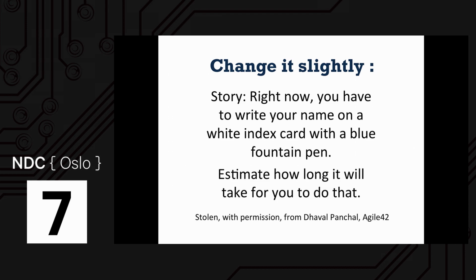that could be optimistic. Because first of all, you don't know what size of an index card we need to write it on. And you don't know if we allow it to have lines on it or not. So that's a beginning. What about another requirement? When I say a blue fountain pen, do I mean a fountain pen with blue ink or a fountain pen that is blue in color? If you brought it to me and it's blue ink and I go, that's not what I meant, use a black fountain pen, then you wouldn't have met the requirement. So this is kind of the problem with estimates a lot of the time. We think we understand what we need to make the estimate of. We'll get onto this a little bit later.